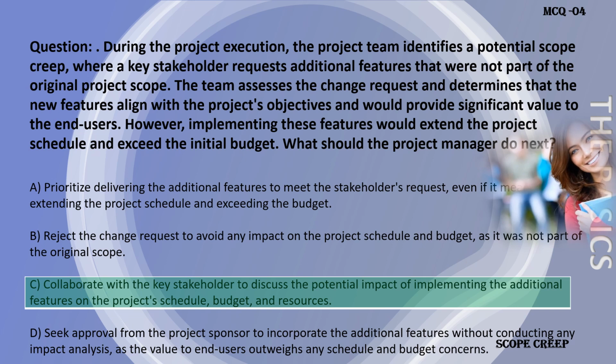Rejecting the change request outright may not be the most customer-centric approach, as the new features may indeed add value to the project. Seeking approval from the project sponsor without conducting an impact analysis is not advisable, as the project sponsor should have a clear understanding of the potential implications before making a decision.